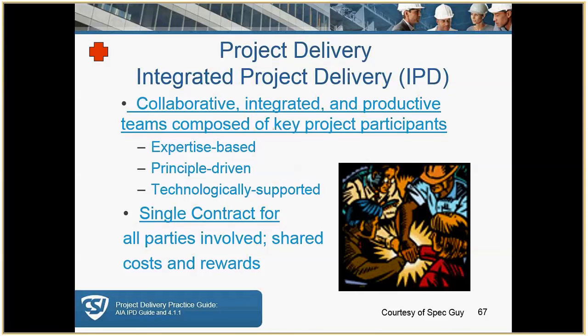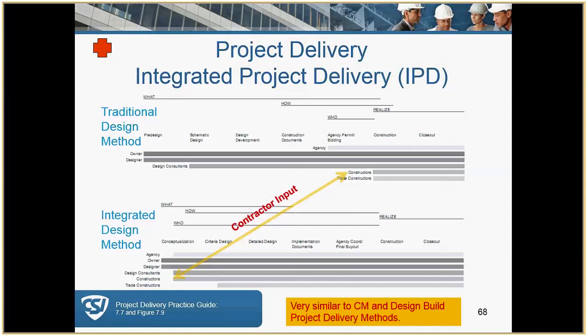One point to bring out is you have to have a very sophisticated owner who understands construction and design very well, so that it's not a contract in which you're there to educate the owner. That's true, and I think you'll see this more with a private owner, developer than public, because this is a risk that the public sector is probably not ready to take. It's similar to CM and design build, but IPD is up and coming.